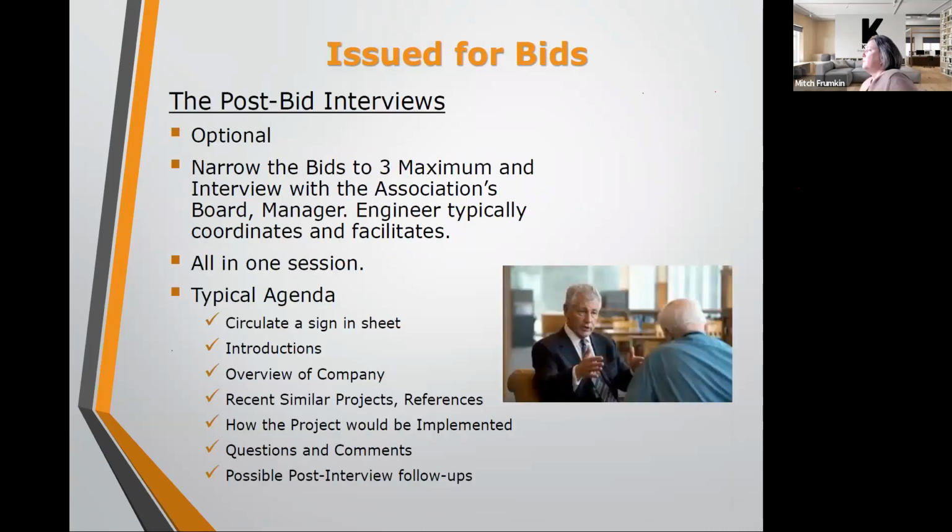Now, after all bids are received, oftentimes if it's a large project, and the association has extra questions for the contractors beyond just the bid return, they will set up contractor interviews and have one contractor come in after another and give each a half-hour slot and ask the different questions of the contractors that they might want to ask. So that helps to narrow down which contractors an association feels are suitable for the project, and ultimately who they want to work with.